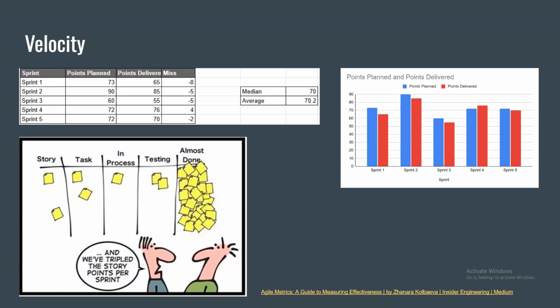So that's why I don't prefer counting your undelivered story points into delivered work. But again, not a matter of debate. Start with one, whichever mechanism you feel the team is more comfortable with, because Agile is about self-empowering the teams, so they will take that. So velocity is just a way for the teams to bring predictability: if my bandwidth is somewhat constant, I'll be able to deliver. And bandwidth is the number of devs or number of hours that you have.